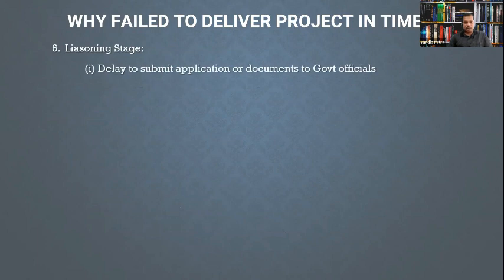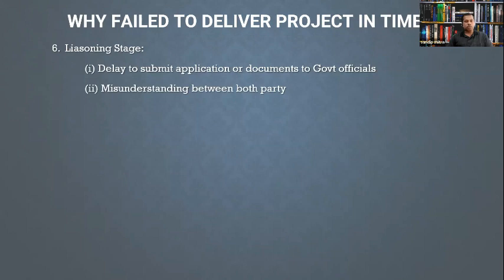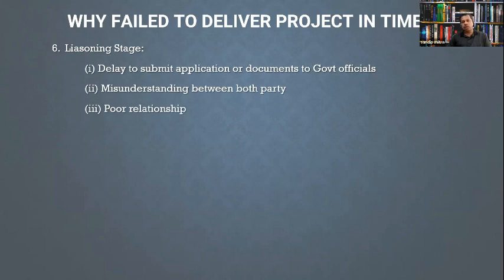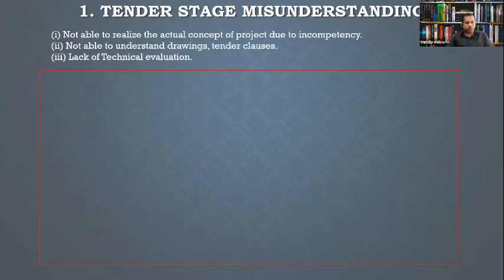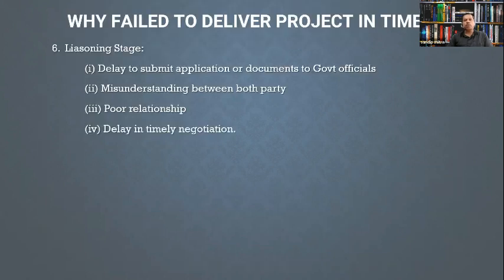In the licensing stage, whoever is dealing with government officials needs to handle the submission of applications and documents properly. Misunderstanding between both parties and a poor relationship with government officials can cause delays. The licensing team must maintain a good relationship with government officials, and delay in timely negotiation is a key reason why projects are not completed on time.